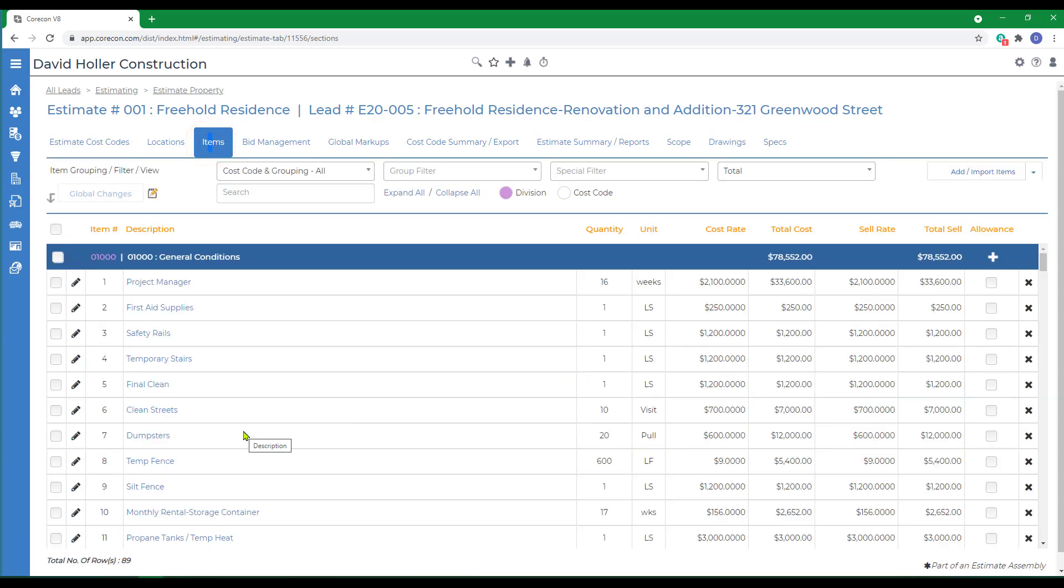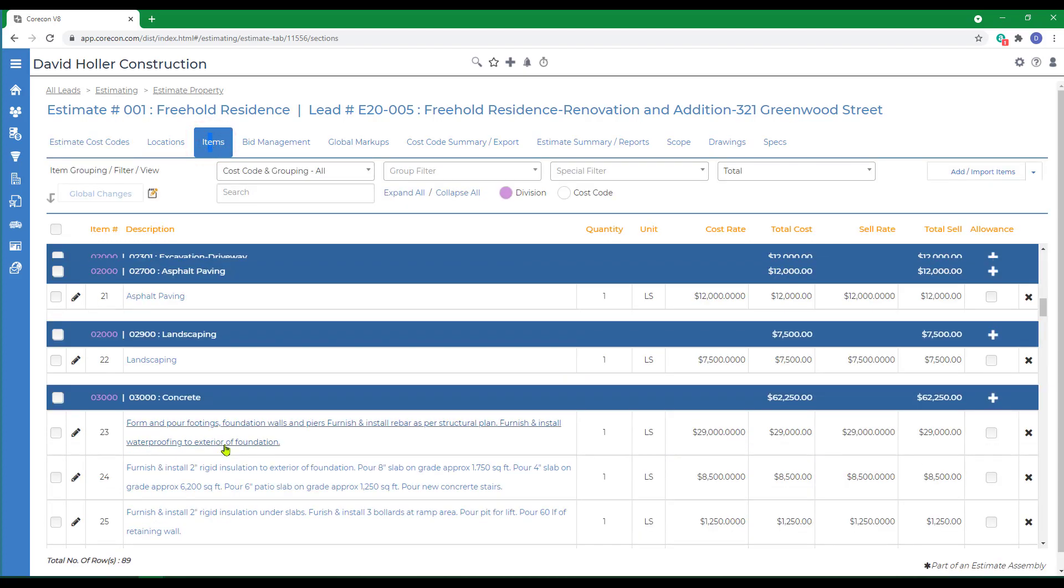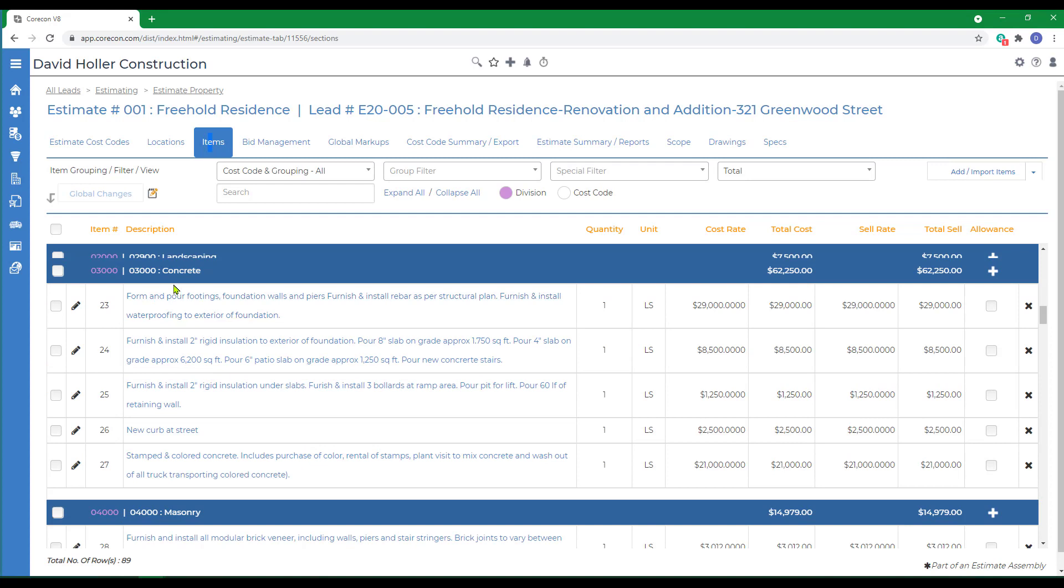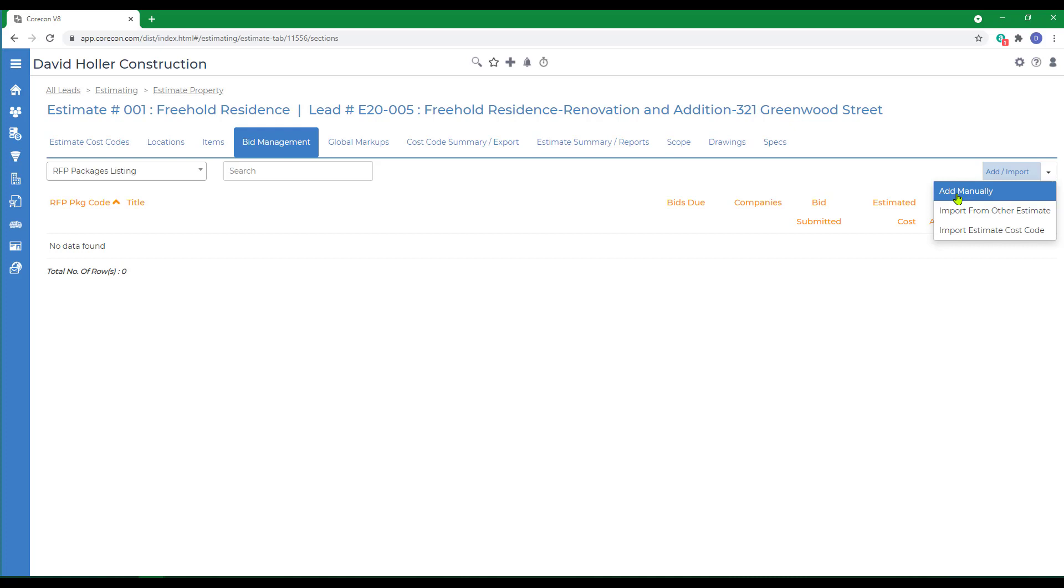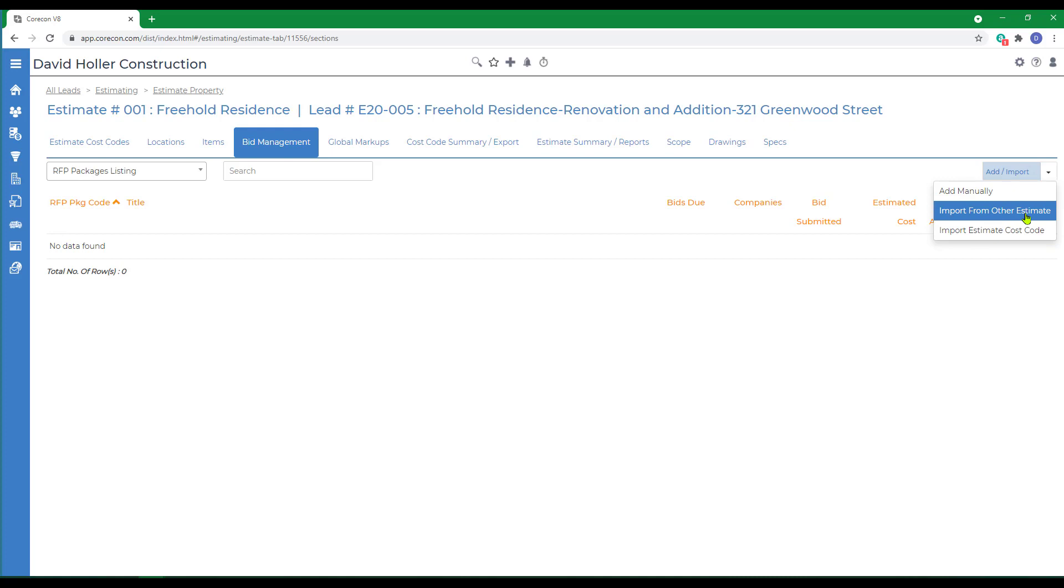Back to the items, and we're going to create a RFP package for these five items under Division 3. We'll go to Bid Management, go to Add Import. It is important to note that there are several ways to import these. You can import estimate cost codes, you can import from other estimates, or you can add manually.